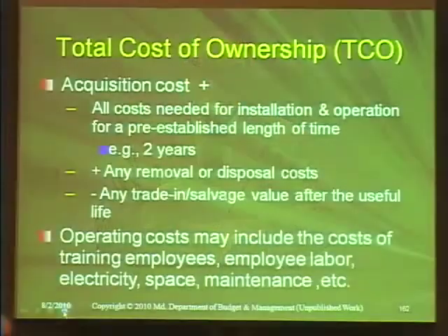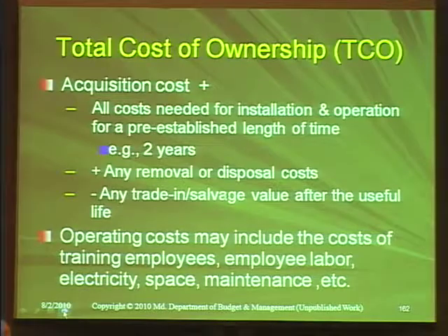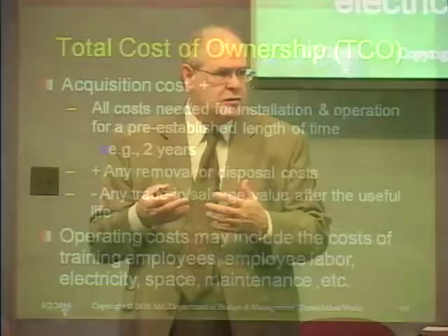and you're going to tell them a specific duration, 3 years, 4 years, 5 years, etc. And you're also going to look at things like cost of electricity. If one piece of equipment is a lot more energy efficient than another piece of equipment, you're going to look at the energy cost to maintain it. If one piece of equipment needs special air conditioning, for instance, if it's information technology, and you need to build a room just for air conditioning to do it, and another one doesn't require that, you impute the cost of the air conditioning and everything to build out to accommodate it.